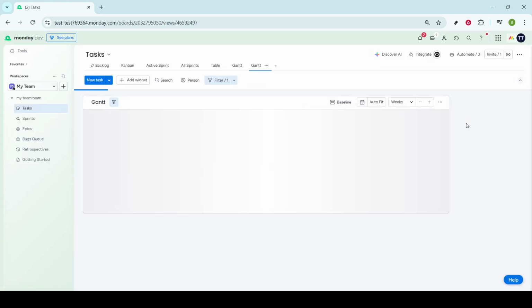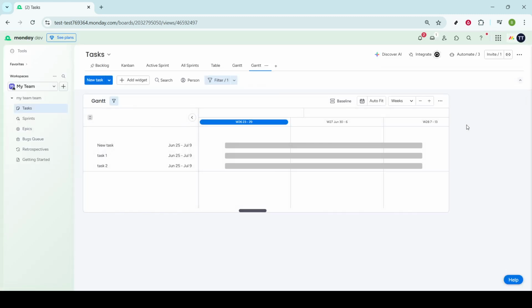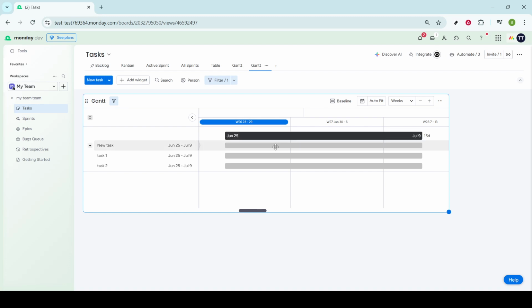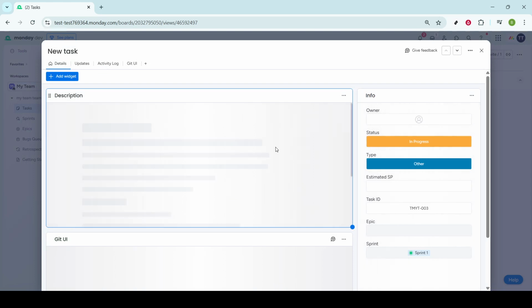Gantt charts are particularly advantageous for milestone tracking, as they give you a visual presentation of your entire project schedule, letting you easily spot overlaps and dependencies. Once you've transitioned into the Gantt view, click directly on the timeline where you wish to insert your milestone. This simple click will automatically generate a milestone at the selected point on your timeline. Yes, it's as easy as that.